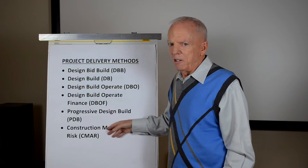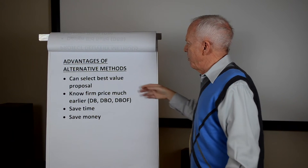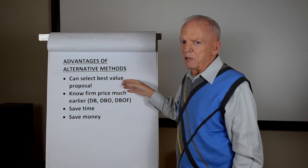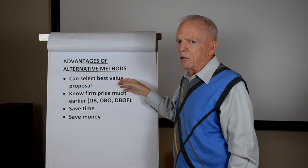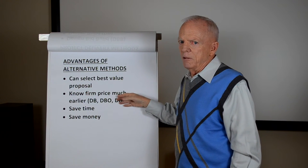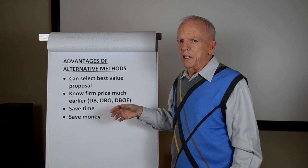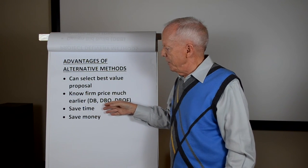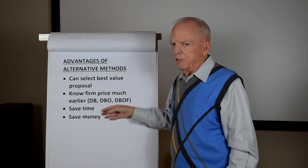Why consider even looking at some of these? There are some potential advantages. One that's very important to owners is they can select the best value project — they are not necessarily stuck with the low bidder. Sometimes the best proposal also has the lowest price, but they're not necessarily bound to the lowest bid. With design-build options you know a firm price right at the start of the job. Conventionally, you may go a year and a half before knowing whether the project will come in within budget. And if it's the right kind of project and the method is appropriately applied, you will save time and money, and there's plenty of documentation of that.